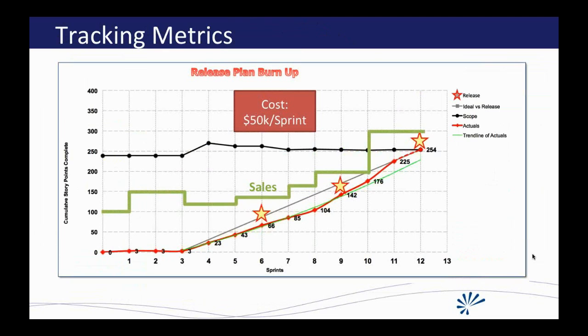So if we're spending $50,000 a sprint and the sales are jumping by that amount, is it worth it? Is it the worthwhile investment? And this is what I want my business to consider and to see. And maybe it isn't. They pull the plug for the good of everyone, except maybe the contractors on the team. But this is an important metric that they need to be able to balance. They need to balance the value in with.